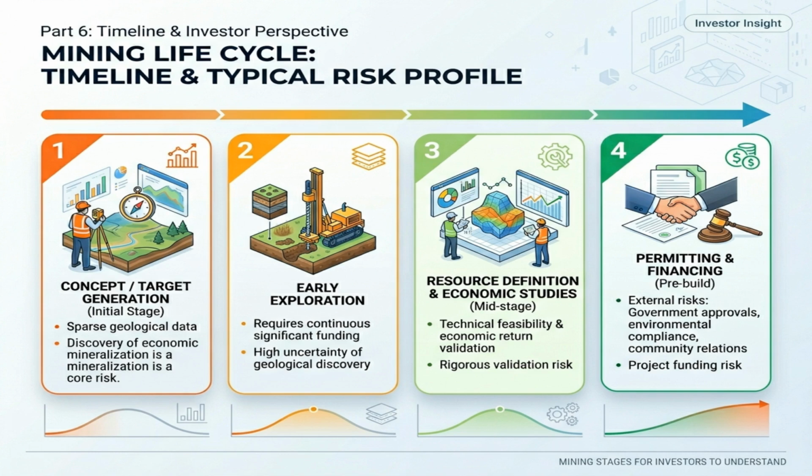This timeline view shows how risk evolves across the mining lifecycle. In the earliest stages, the biggest uncertainty is geological. Is there a real deposit, and is it economic? As the project advances into resource definition and economic studies, technical validation becomes the focus. Permitting and financing introduce external and funding risks before construction begins. In short, risk does not disappear as a project matures, it changes form.